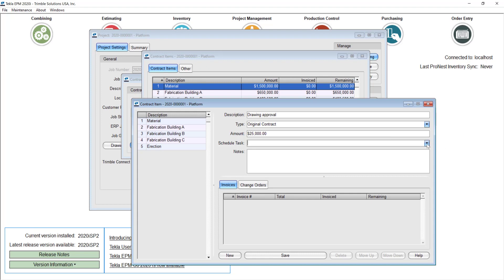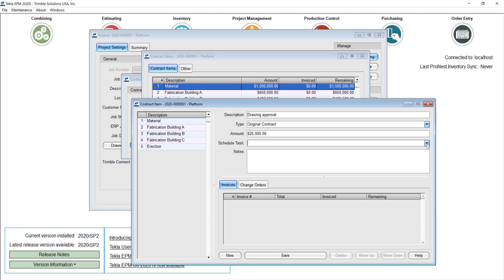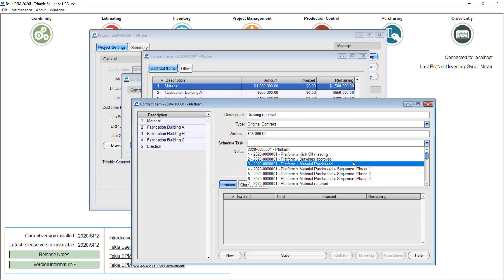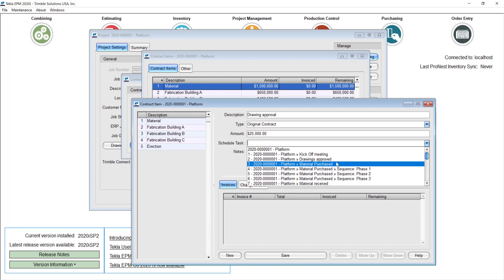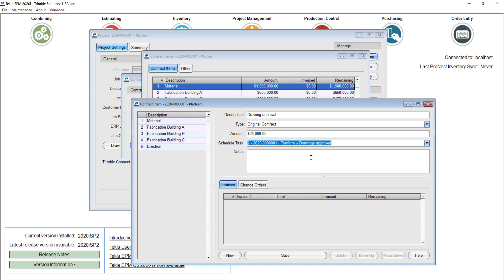This is very important for the rest of the concepts as well. You have the option to link this to a task from your project schedule. In that way you will be able to invoice the percentage of the concept that you have already completed. In Tecla APM you can get those numbers in real time. I'll link the drawings approval to my drawing approved concept from the Gantt chart and save this.